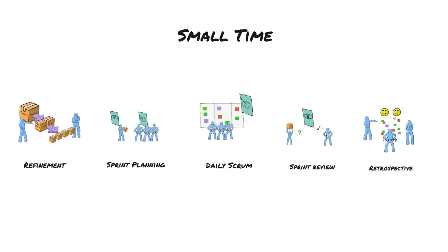Before the next sprint, the team has a retrospective, often facilitated by the Scrum Master. They decide if they want to change how they want to work in the next sprint, understanding what they've learned from the previous sprint.